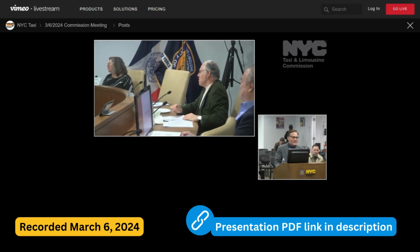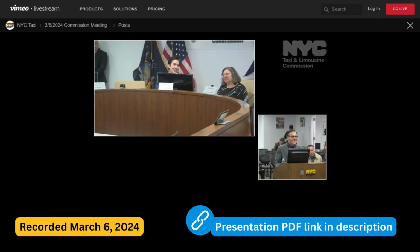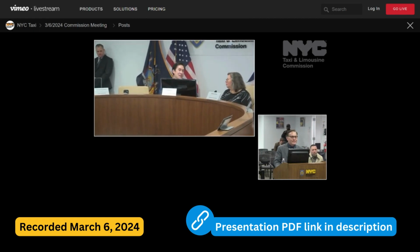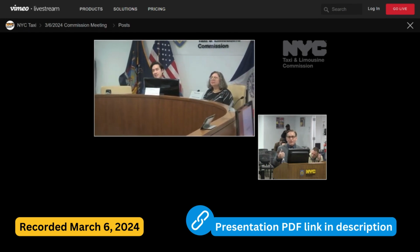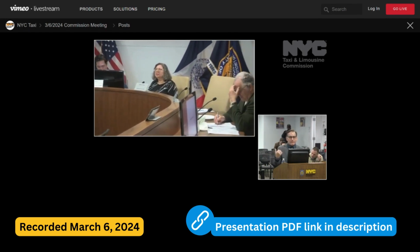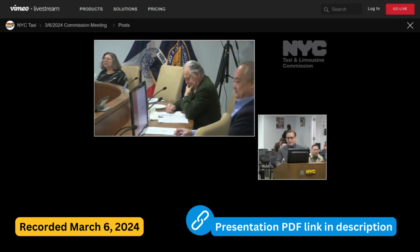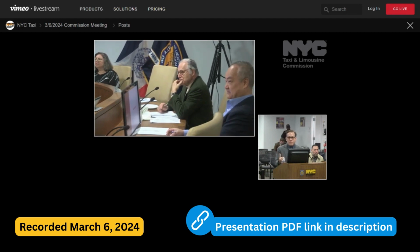Sometimes architectural design doesn't meet function, and that's one of the things that we're definitely taking a good look at. It looks good by design, but maybe not by function. Exactly. These renderings are from the original design, the procurement documents that were sent out, and it was created in 2015. So those benches haven't been ordered yet.